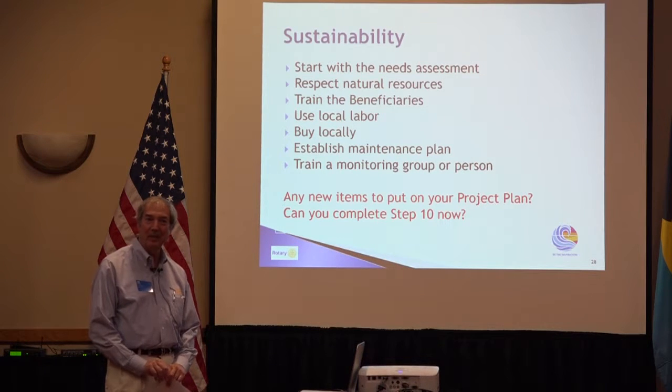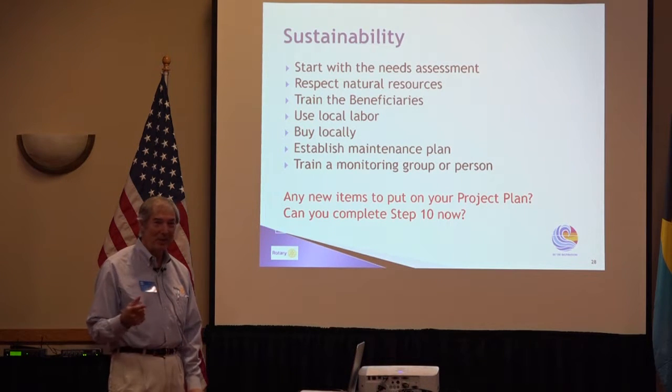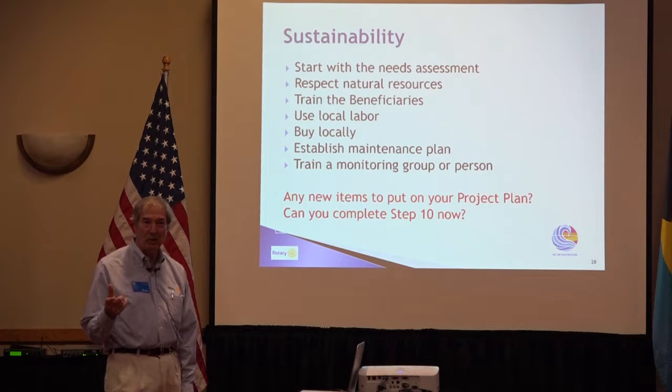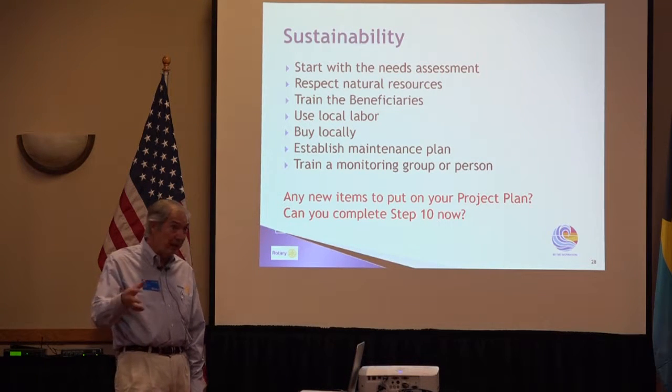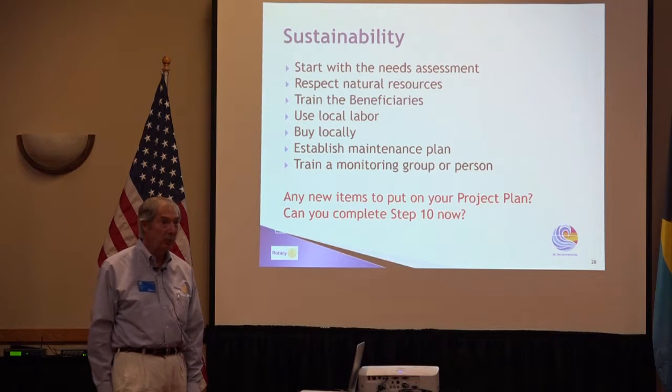You've got to get local adaptation. Sometimes, yeah, you've got to get bids locally, but you go to places in some countries and you get a bid that's only good until sundown. Yeah, I mean, that's a quote, but it's only good until today. You know, tomorrow, new prices.